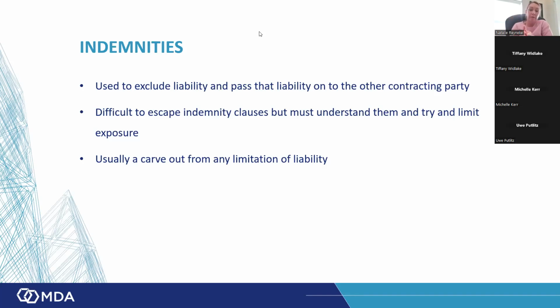What then would have to happen is that the employer would have to use the mechanisms in the contract to extend the defect's liability period for the period that he was unable to use that particular portion of the works due to the defect. And if he doesn't do that, that would then fall away. So that's why they allow for that extension of the defect's liability period. And it's limited only to the time frame that you couldn't actually use the work based on that defect.